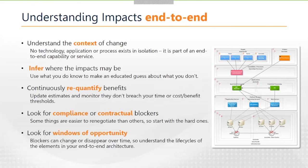Understanding those impacts is fairly key. You don't always have the data you need to track all those impacts, and that's where we use a technique we call inference — we actually use algorithms to do it, but you can do it manually. That's really about understanding how to infer what you don't know. For example, if we have a sales application and we don't know whether it talks to our billing application, but we do know the sales process uses it and talks to the billing process, we can start to infer what some of the integrations or dependencies might be even when the data is missing.